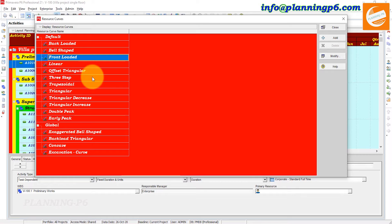Depending on the distribution type, resource curves can be linear, back-loaded, front-loaded, triangular, and so on. If you have an activity with a non-linear resource loading, it is possible to create a custom resource curve to model the resource distribution.